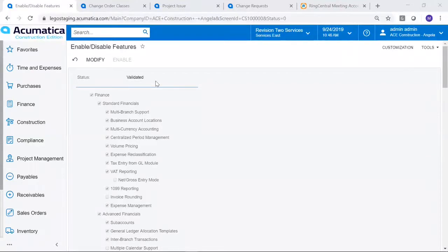As you are well aware, change management functionality for projects exists in Acumatica. We use that to analyze profitability, and track and control project changes for construction projects. With 2019 R2, we've introduced the change requests feature. Change requests are basically detailed breakdowns of potential changes to a project budget and commitments, such as additions, deletions, or edits to an existing cost or revenue budget.